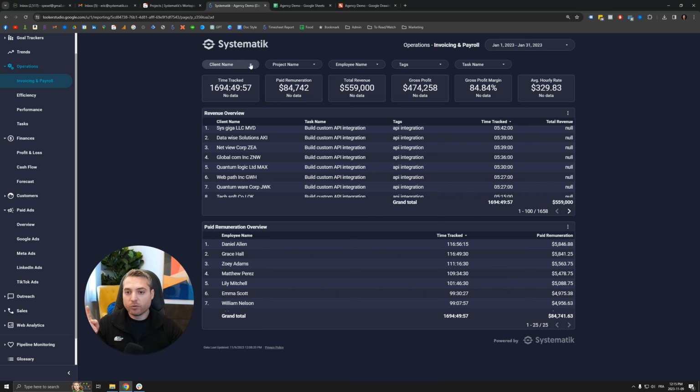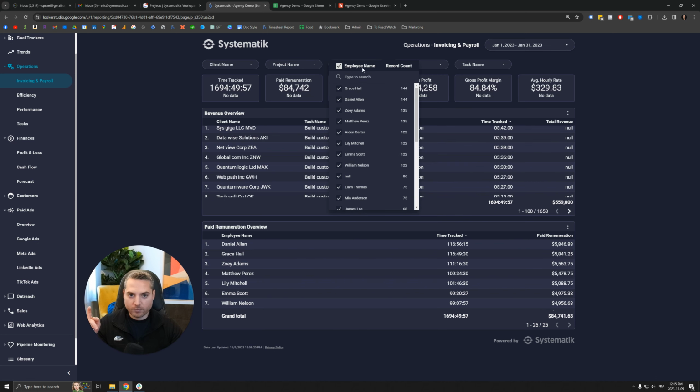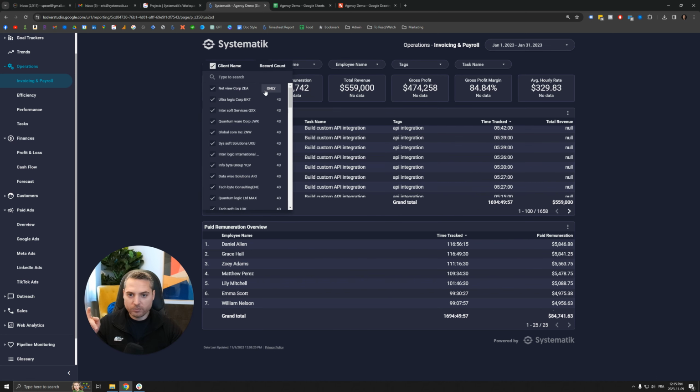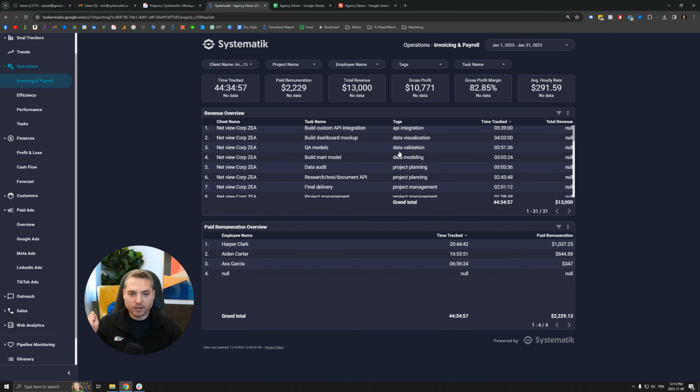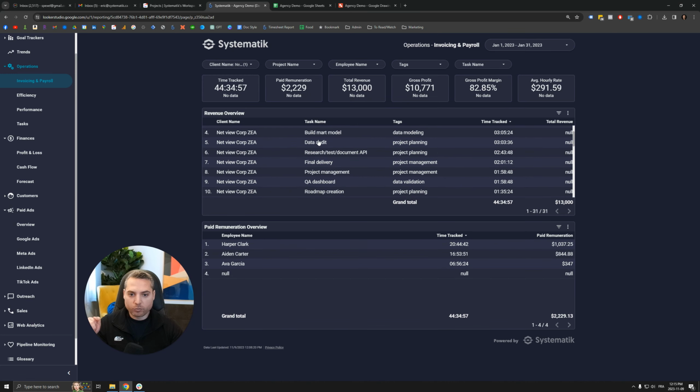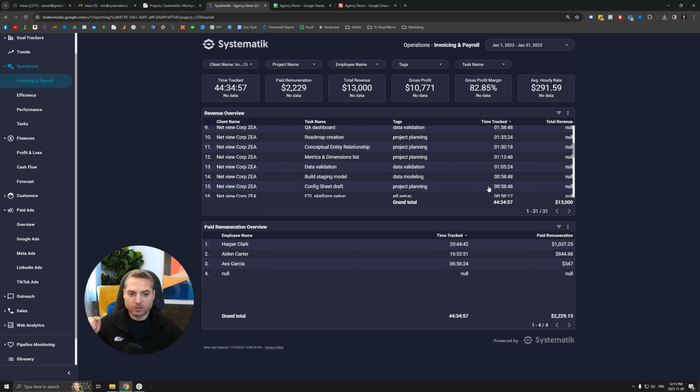This would give me the number, how much I should be paying them, right? And if I need to create an invoice for a customer, I would select the client, for example. In this case, this is a fixed price project, so we have the total here of how much we should charge them and the breakdown of every task and the time spent on every task. So I know how much I spent in salary, paid remuneration for this project. I know my gross profit margin. I know the average hourly rate we've made on this project and the gross profit. So that's really cool, very helpful.